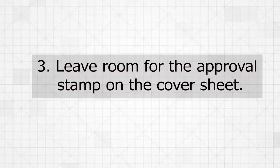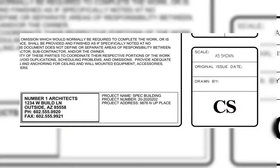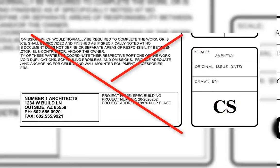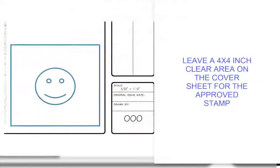Third, you must leave room for the approval stamp on the cover sheet. Customers often submit plans that look like this, but there's no place for the stamp. Without the stamp, the permit will not be issued. Leave a 4x4 inch clear area on the cover sheet for this stamp. This helps your review move efficiently without unnecessary delays.